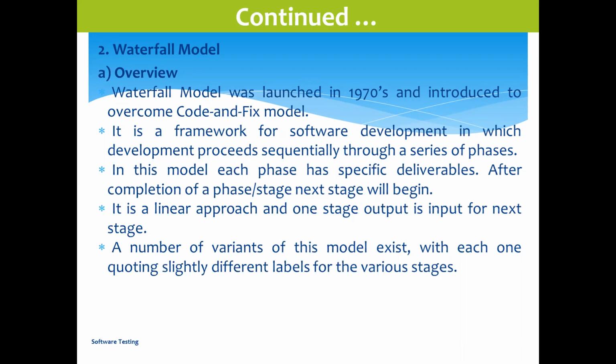So suppose six phases are there. If one phase is taking 3 days, then on the fourth day we can start the second phase. If that is taking 2 days, then again on the seventh day we can do the next phase. So till that time, sit idle, explore. Parallel work cannot be done. That is one big problem here. Other things are good, but this is the big problem. Parallelly we cannot do; if you are not able to work in parallel, then it will be time taking.